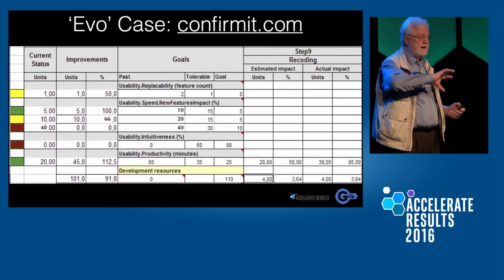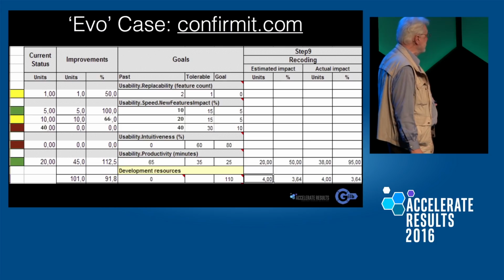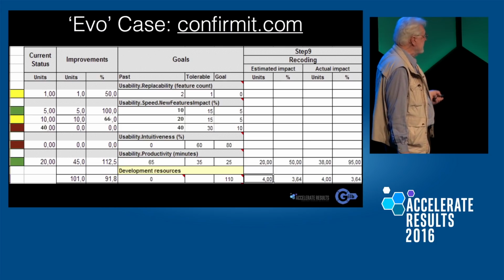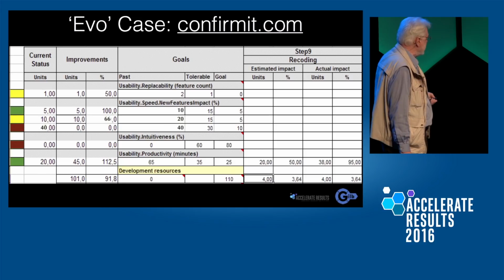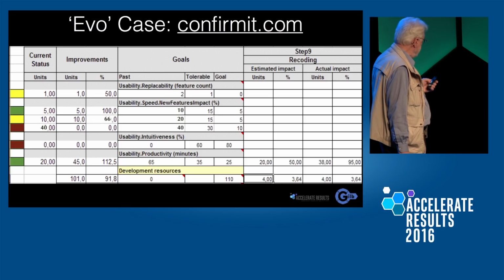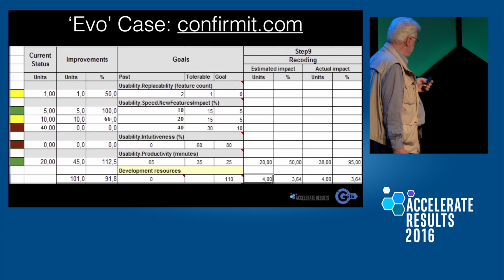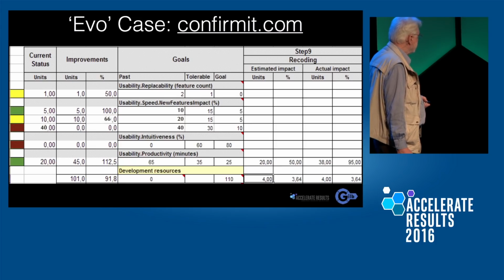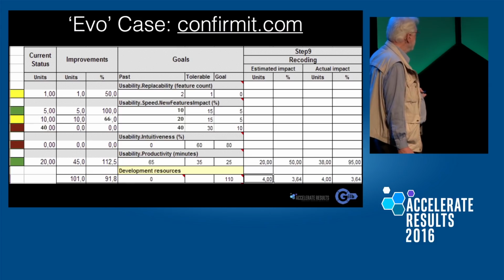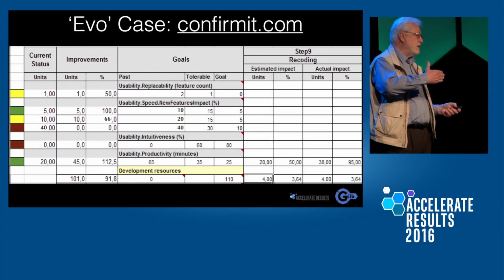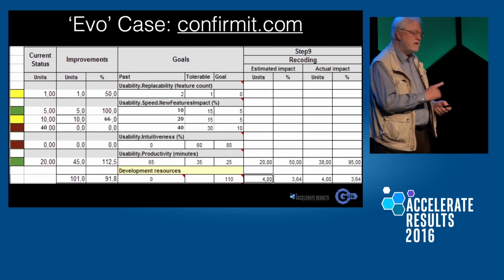You're looking at a thing I call dynamic design to cost, but you're looking at all kinds of decompositions. One kind of decomposition is we have 25 different goals, of which a team takes care of about a fourth of them, okay? And then you have a very clear idea of what it means to reach each of the goals. It's moving from here to here. The designers can then speculate, well, what would get us to the goal and make an estimate, a tricky business, but they weren't too badly off when they said 20 minutes, even though the real answer was 38 minutes. Some of that could be that they did smart things after they decided to do it, that they hadn't foreseen at that point. Okay? But anyway, so this is one, and they're also saying we're going to do something every week no matter what. This is 2003.